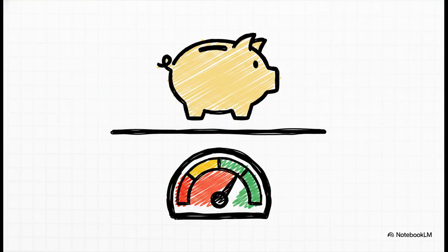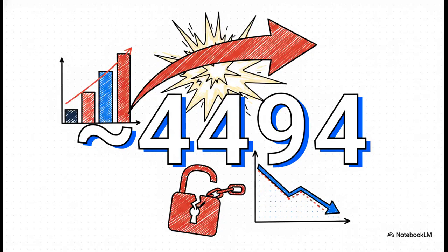And look at this. See how it all connects? To get this forecast, we take our original budgeted completion, that was $4,000, and we divide it by our Cost Performance Index, that ugly 0.89 we just calculated. It's basically saying, let's adjust the total budget based on our current inefficiency. And the result is about 4,494. Now remember, our original budget, the BAC, was 4,000. This is a massive red flag. It's telling us that if things don't change, we're not just going to be a little over budget. We're on track to blow past it by almost 500.